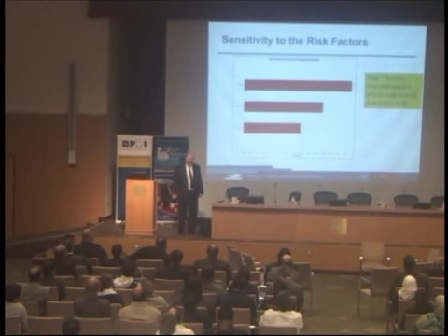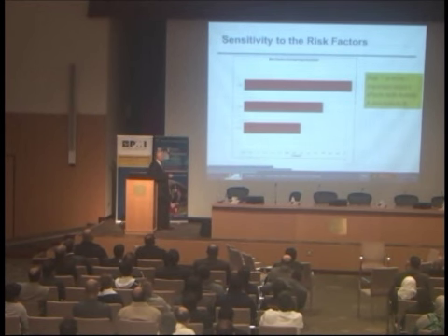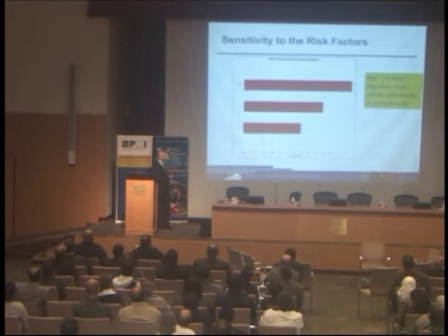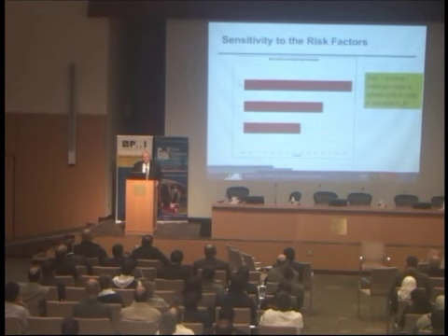But now wait a minute, we don't really care which activity is important. What we care about is which risk is important. And in the risk factors module and in Polaris, for instance, you will get risk 1, risk 3, risk 2. This is a risk tornado, and you should be able to get a risk tornado for cost as well. I think that capability was broken. I'm not sure they fixed it or not.